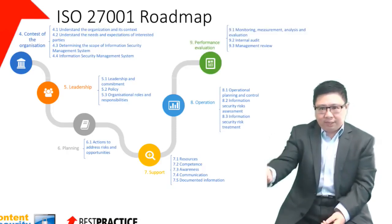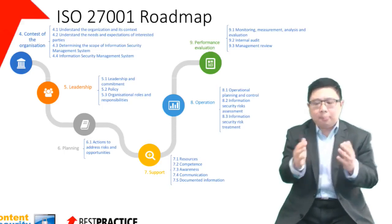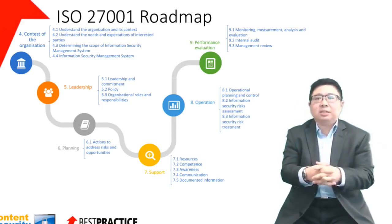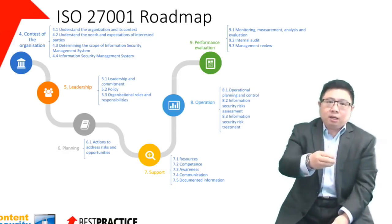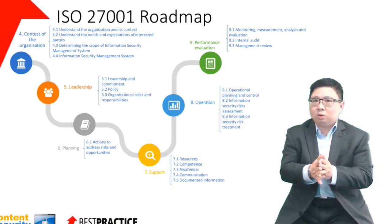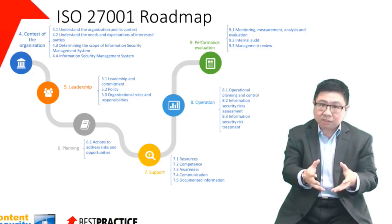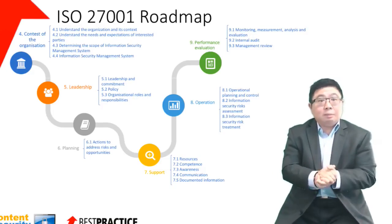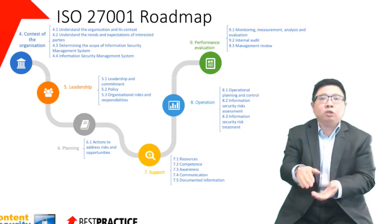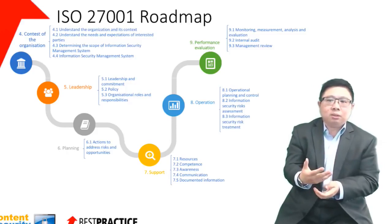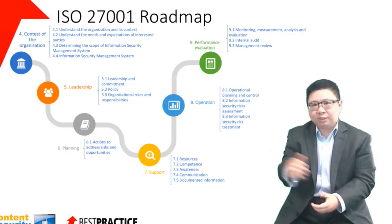Towards the end of implementation — and on a yearly basis — what needs to happen is to build what we call key risk indicators or key performance indices, to enable the monitoring of the project. This allows you to look at whether you are behind schedule, whether certain risks highlighted during the risk management phase need immediate action, or whether budgets have not been sufficient and need to be revisited. The monitoring and measurement phase allows you to manage the project and ensure a successful return at the end of the day.